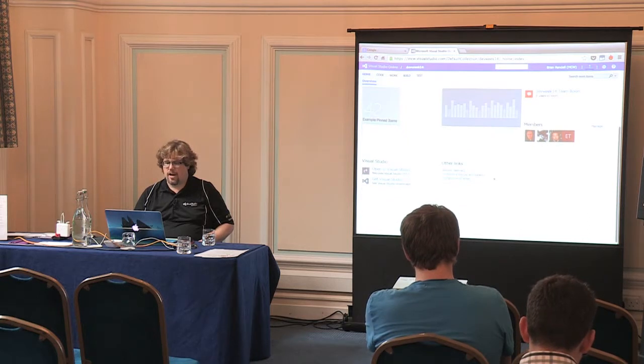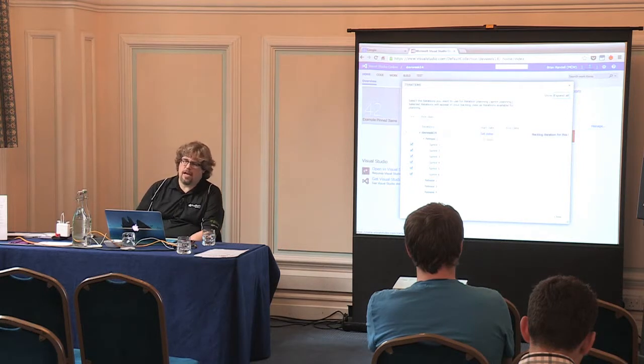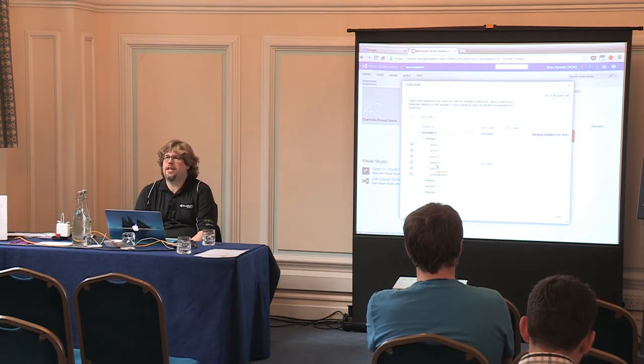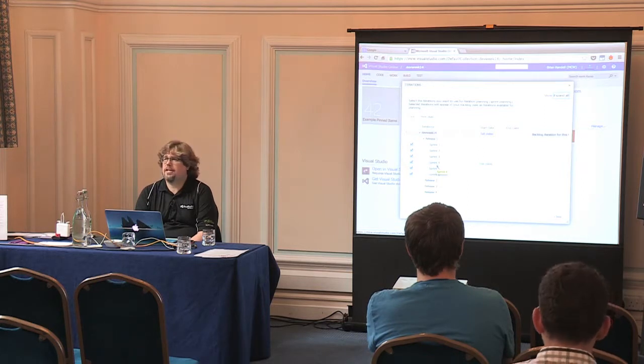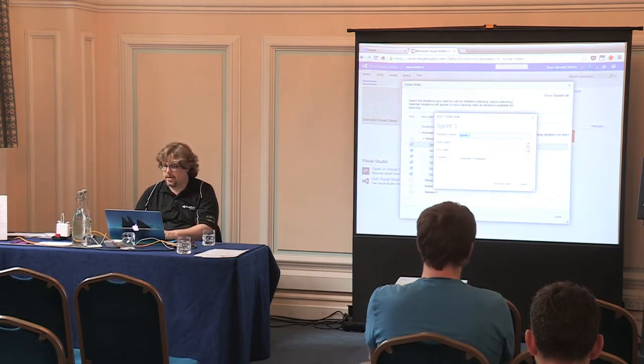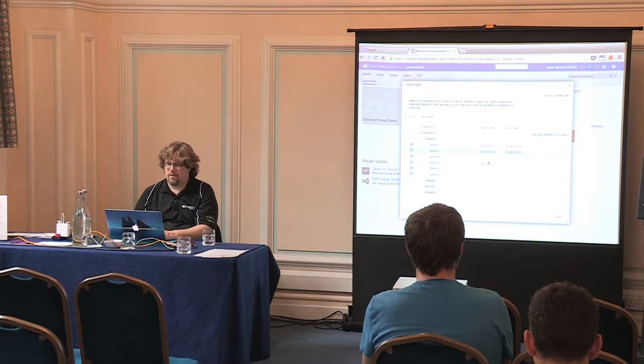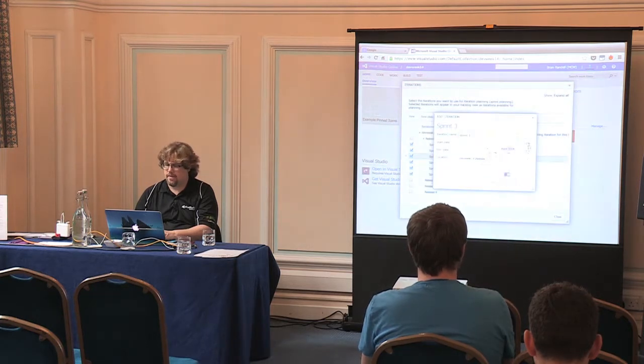Now that you have your team members added, the next thing you might want to do is come in and define your scheduled iterations. Depending upon the template, these will say either sprints or iterations, but basically they represent time boxes. A period of time with a start and end date that you're going to try and get work done. This is important for the system to help you create things like burndown charts to show you how you're doing on your work. So I'll come up here to the first one, select set dates, and since I just created the project, I'll use today as a start date. And I'll use 2 week sprints, and we'll save. And I'll go and do another one. And when I go pick the date, they'll provide what they think is the next logical date. And go forward, and you can then create other ones as you see fit.